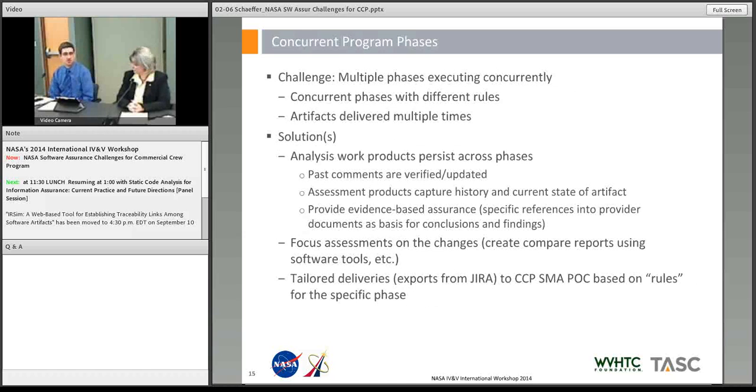And like I said, these phases were running concurrently. What really complicated things was that the development lifecycle maturity for the milestones associated with these phases may not be in line. We may be dealing with a PDR level maturity under CPC when CCI cap is already progressing near CDR. So we might be getting documents that have an older revision than what we've already seen under CCI cap.